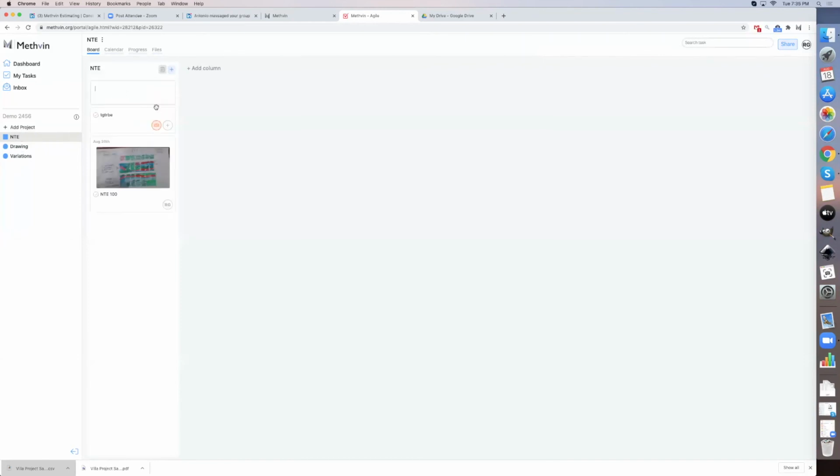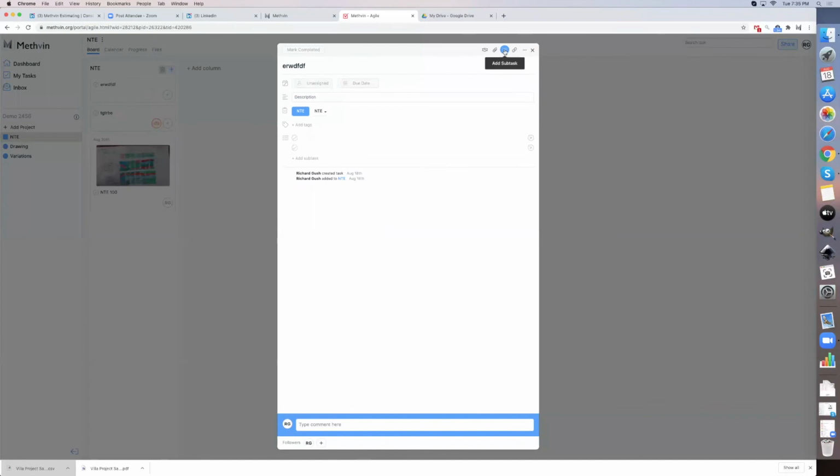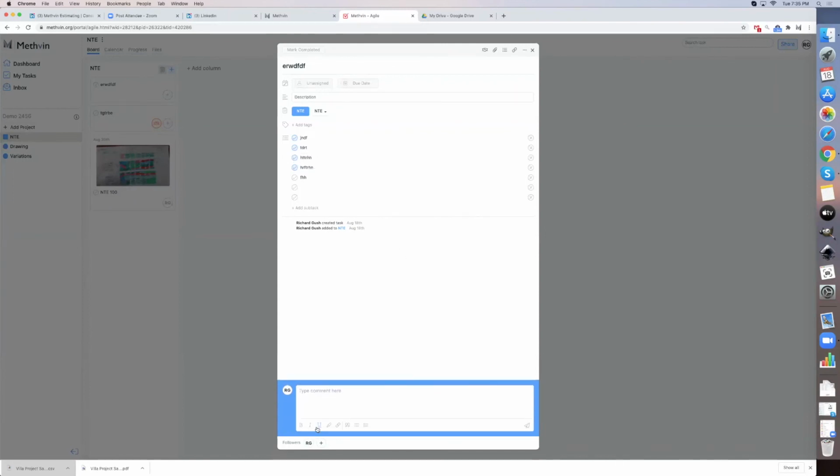Another option that you can use it for is for your quality and all the rest. You've got an option here to have a whole lot of sub items, and you can give them a nice name, your piling depth, your concrete you're using, the pile diameter, and so on. And as you sign them off, it date stamps them for you, and then you can write to the client saying, thanks, this pile card is now finished for your review.